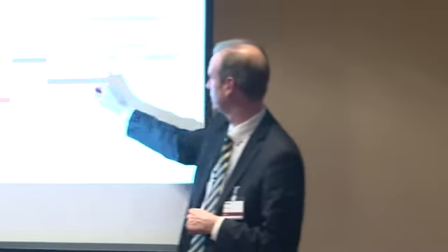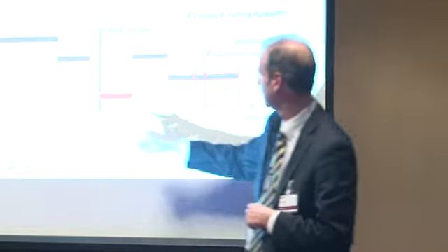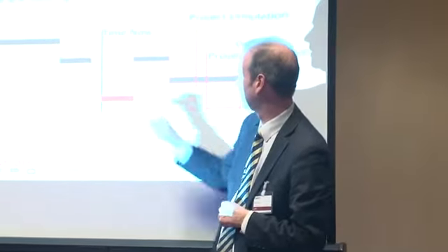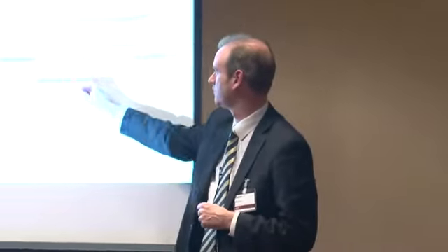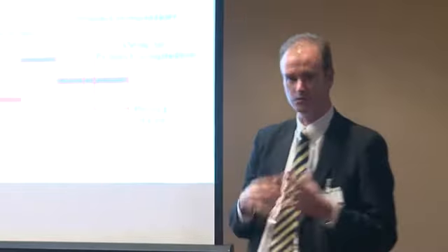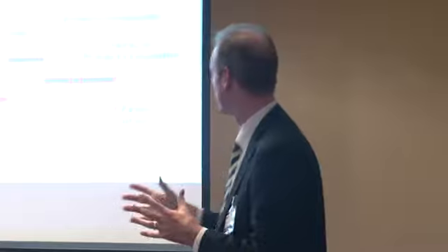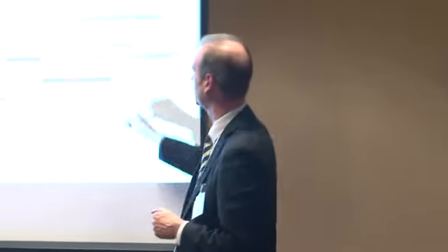But what we've done now is, in looking at this overall period of delay, we've actually managed to find that this little bit of delay was caused by the contractor's slow progress, and this bit of the delay is caused by the delaying event. So we're really now getting to grips with explaining this overall delay. All too often I look at projects and get to the end, and people just see this overall delay. And it's a matter of disentangling the delays as and when they occur to explain the build-up of this overall delay.